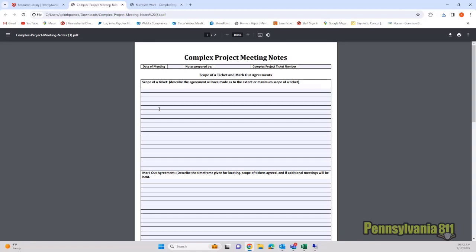Maria and I had already talked, and we're going to do the saw cutting phase for the entire project. Then we're going to do the mainline phase, putting mainline all the way through and making sure that we get it all pressurized and everything ready to go. And then we're going to do the laterals so that we don't have people without gas for more than the amount of time it takes to hook up a new lateral.